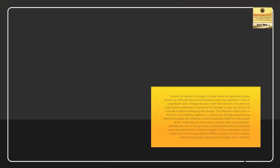Assess the impact of changes. Change orders are generally always necessary, although well-planned projects may only experience a few or insignificant ones. Change requests might take the form of a directive, ordering the contractor to implement the change, or they can ask for an evaluation before authorizing the change. This alteration might come in the form of an addition, deletion, or substitution. Change requests may affect the budget, the schedule, or both.